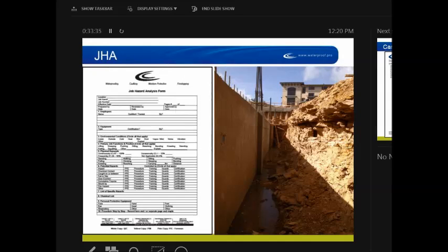Job hazard analysis is exactly why we go to a job site when you see a condition like that. We expect our guys to go there and do below-grade waterproofing the next day, and if we do a tabletop pre-con, that's what you miss. Either you have a foreman who will try to get into an area he feels is safe, or he'll report it and say, I'm not going in there. Let's not even put him in that situation.